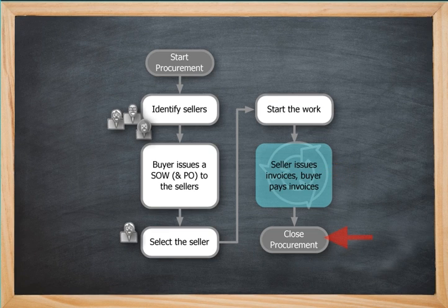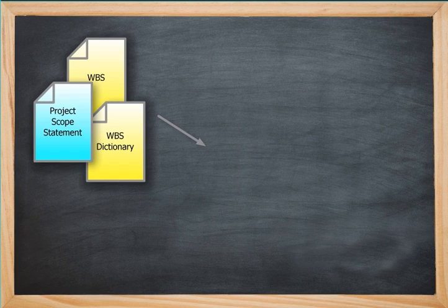The statement of work most commonly uses the acronym SOW. At this point, there's usually a maintenance or warranty period, but for all intents and purposes, the work has been completed. The scope baseline defines the work and generally has the following three components: the project scope statement, the WBS, which is the work breakdown structure, and the associated WBS dictionary.